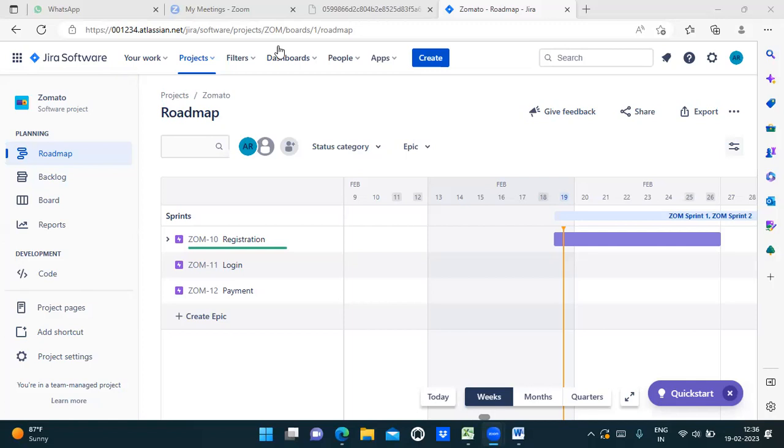In the same manner, the functional team or the client will also have another list called definition of done. When you want to submit your sprint to the client, you will check against the DoD. Okay, is DoD all completed? Only then you can say that your sprint is successful.